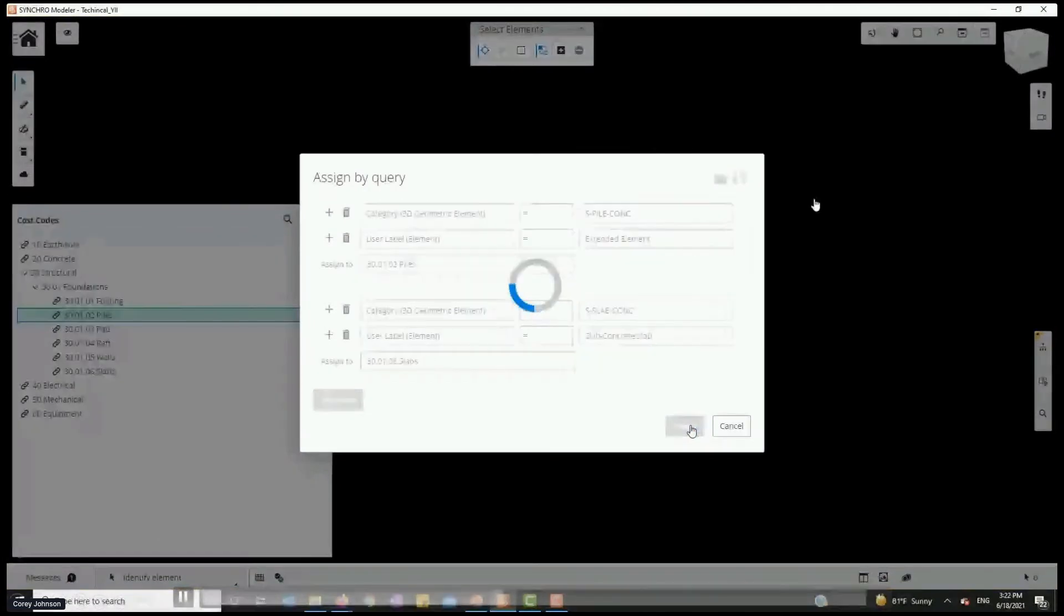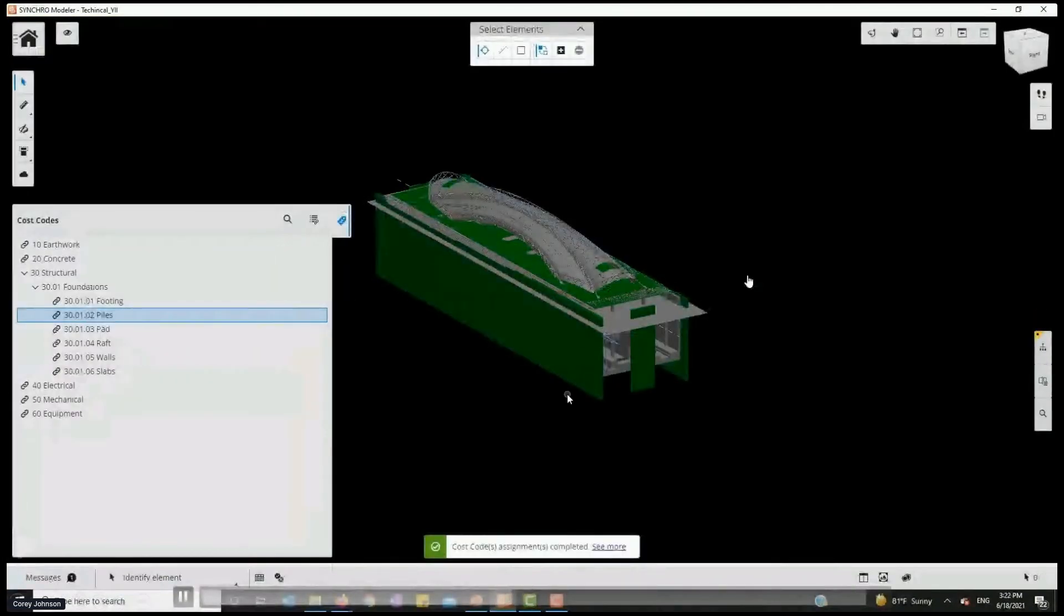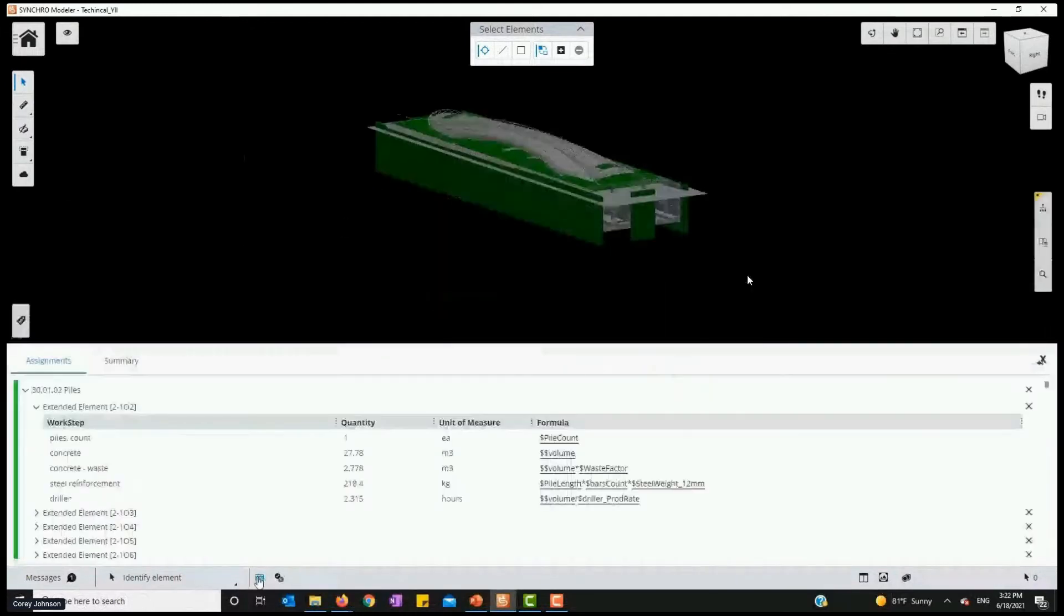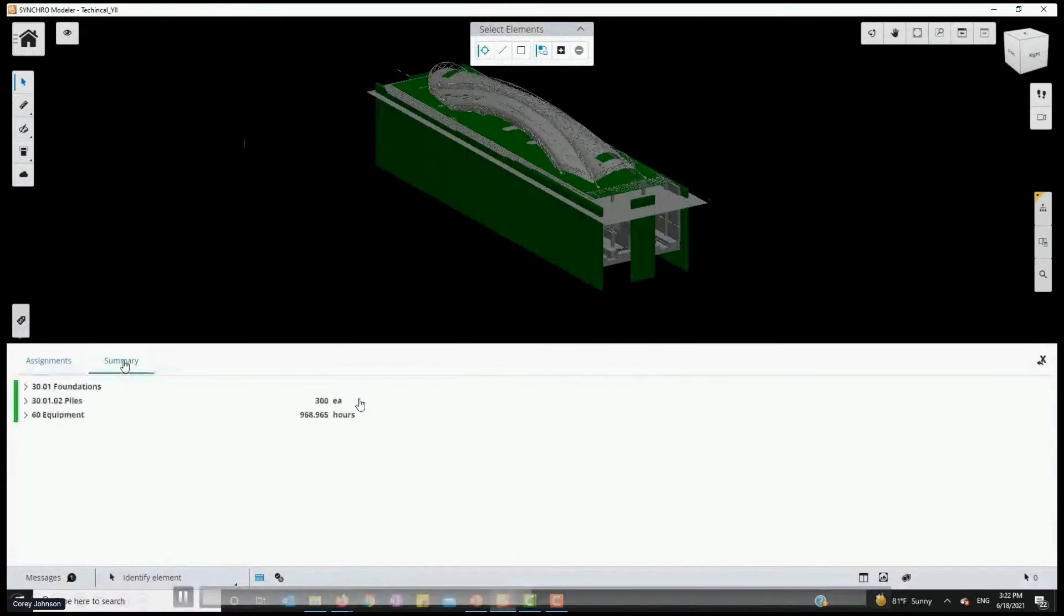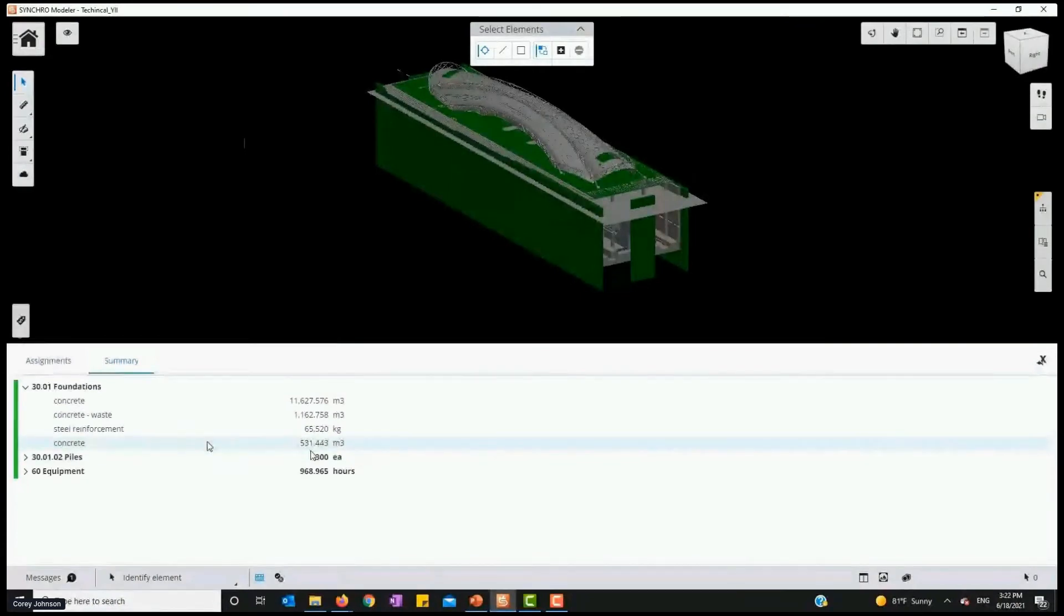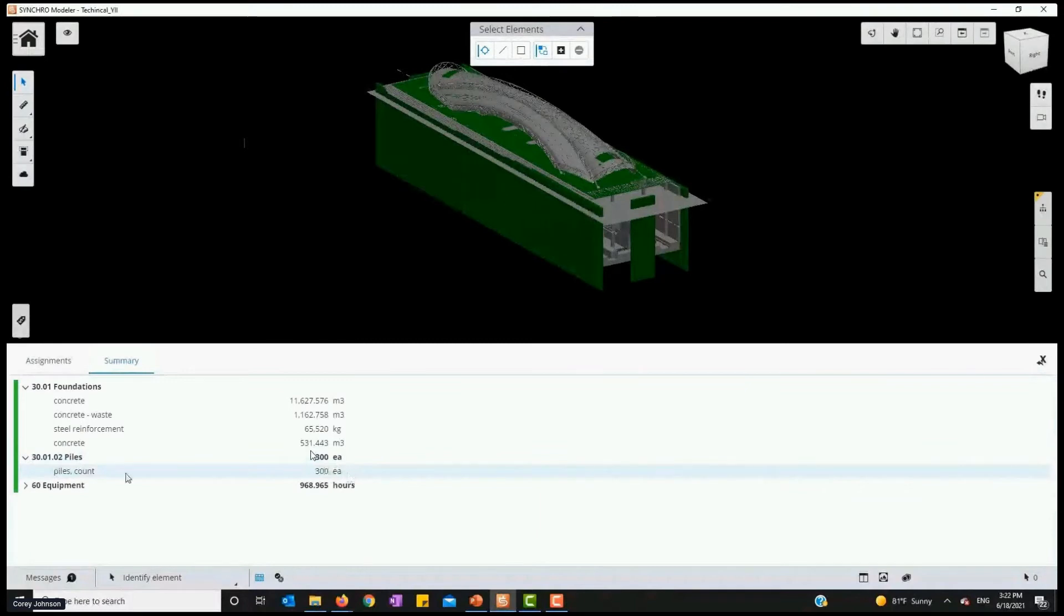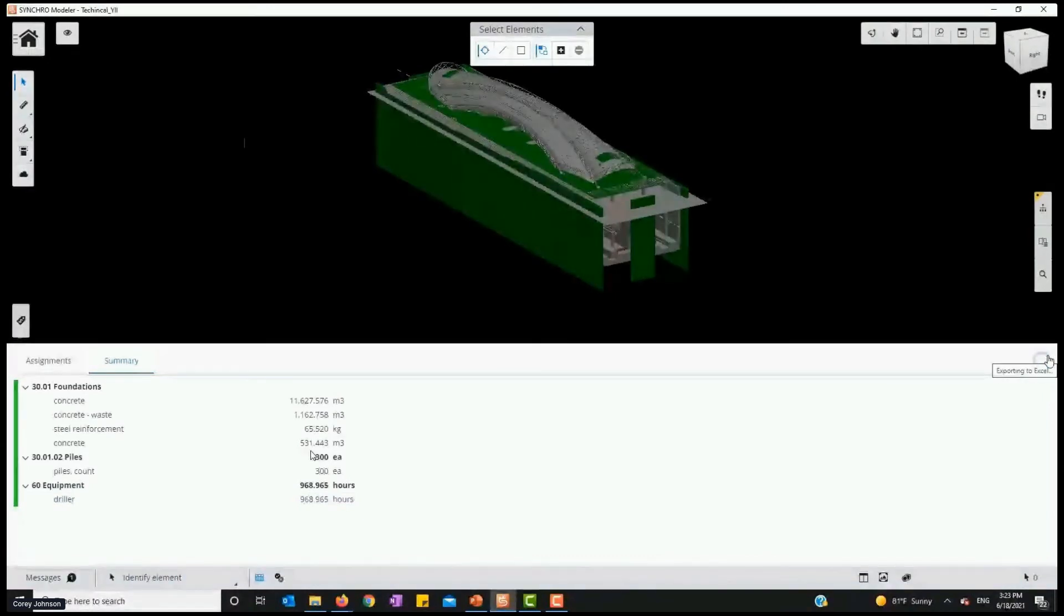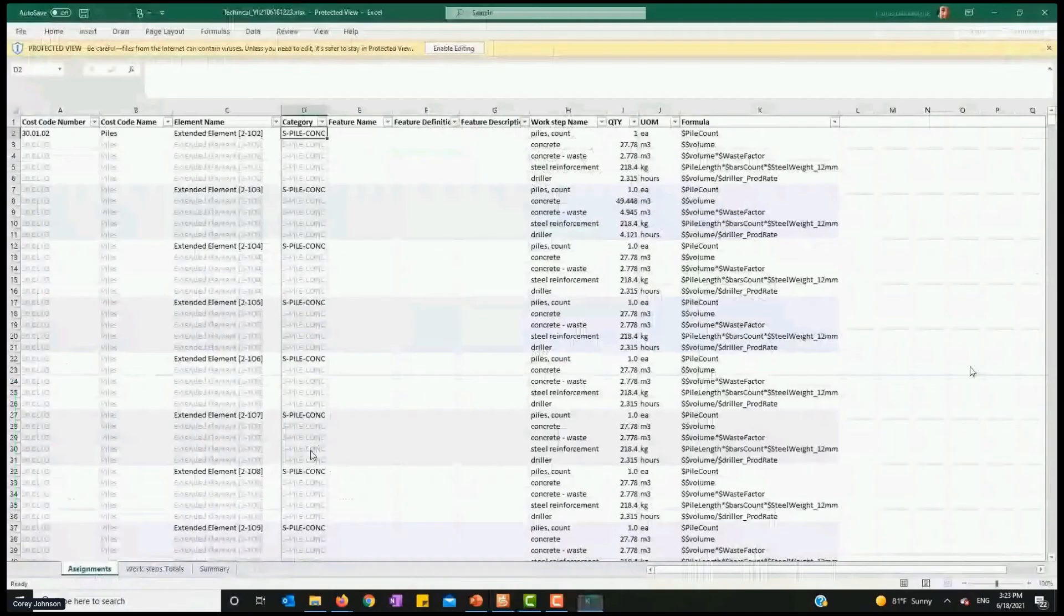Find them all on my project and assign them all. So now I got lots of green on my model, and we can turn those things off and on. But here we step through and we can get a very quick summary. There's 300 piles, there's my concrete floors that I need to pour, and I can see how much concrete is there. I can see roughly how many man hours it's going to take for that driller to do those piles. We did that in seconds, and that's based on our historical and our cost codes.